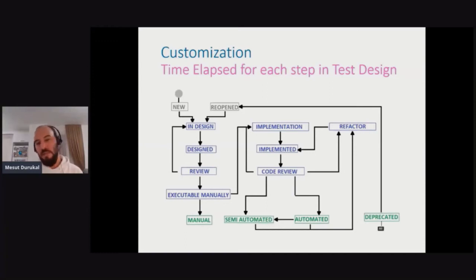I mean, in the slide, I put an example, and you see all the statuses of the issues in our life cycle. We use Jira for the issue tracking system, and normally we have a couple of statuses for the items. Normally at the beginning it is open, and then it is in progress, and at the end it is completed. But now we see lots of statuses, right? Because I want to see all the state transition points, and when it is under design progress, and after the design is completed, we put it into review progress, and I want to see all of them.